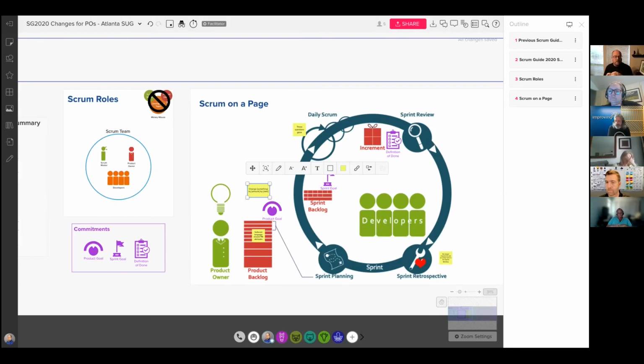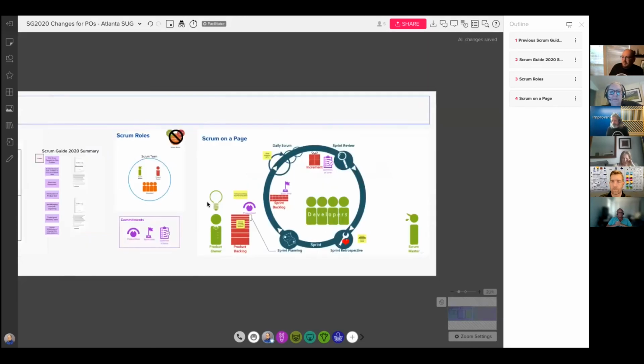Whereas if our main objective was to get all the backlog items done, and done just meant sitting in our staging environment ready for a big release, then we haven't actually delivered any value to anyone yet. And it's all a guess. And it's a dangerous guess because we may not ever get a return on the investment of this year of development without a single release. Anyway, yep. Good feedback. Thank you. Yeah, no, great. And so that's the product goal thing.